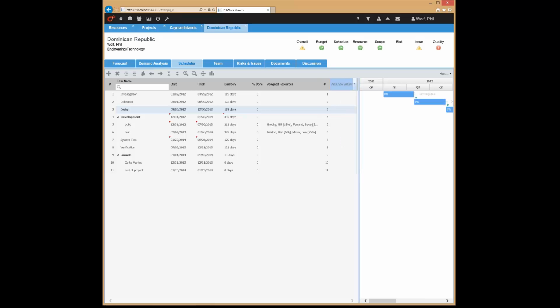We've added a huge amount of columns that are available in the scheduler that you can track. You can have mandatory start and finish for tasks. You can have lag. A huge amount of functionality that we did not have before that we've added to the scheduler, trying to make it so that if you don't really need the heavy hitting of Microsoft Project, you can actually build a very complete project task plan using the online scheduler that we have.